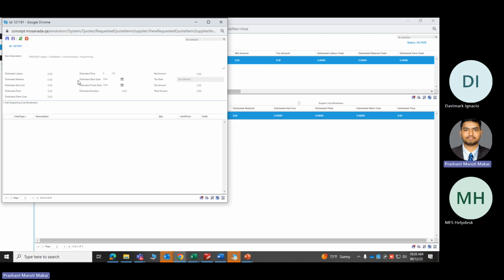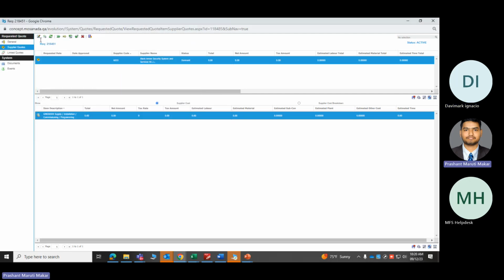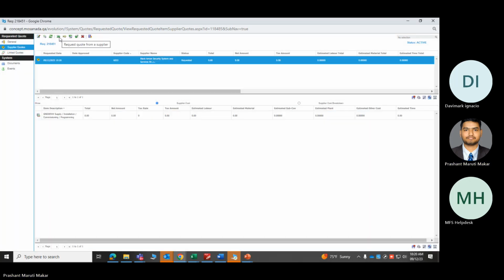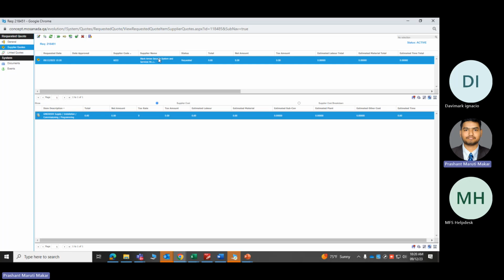Right now I have not requested, so it is not coming, but you have to put the cost over here. Once it is requested, I will assign it to the particular contractor. Anyway, I will request it, then let us see. This is the venue engineer, so they have requested now. The quotation has been requested, and this notification went to the particular contractor, that is Black Arrow.